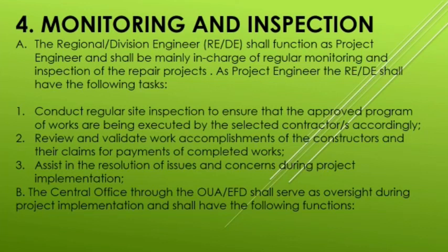Then, review and validate work accomplishments of the contractors and their claims for payments of completed work. So sometimes it is based on the percentage. If ano na ba yung natapos na, 10% or 20%. Then, third, assist the resolution of issues and concerns during project implementation. So, if merong mga problem that occurred na na-report ng school head or ni teachers or ng community regarding the repair, then they will be the one to assist.